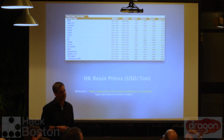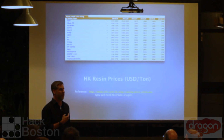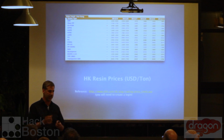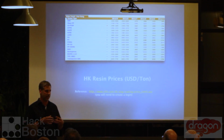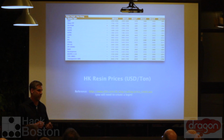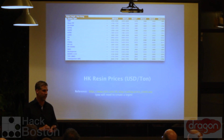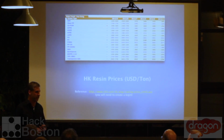I don't remember. Did you have the mold cost? I didn't include the mold cost, and I don't get into too much detail here, but the things that drive the mold cost: in China we use mold bases, so a mold like this is probably this big, and it's got all the mechanism from the different plates and the ejector pins. I always use steel molds, but is it steel or aluminum? Aluminum's a little bit cheaper, but we're not tooled up in China for that. And then is it a soft tool or a hard tool? A soft tool you'll get 50,000 shots out of roughly. A hard tool you'll get 500,000. If you're Lego, you'll get 2 million because they're really good at this stuff.